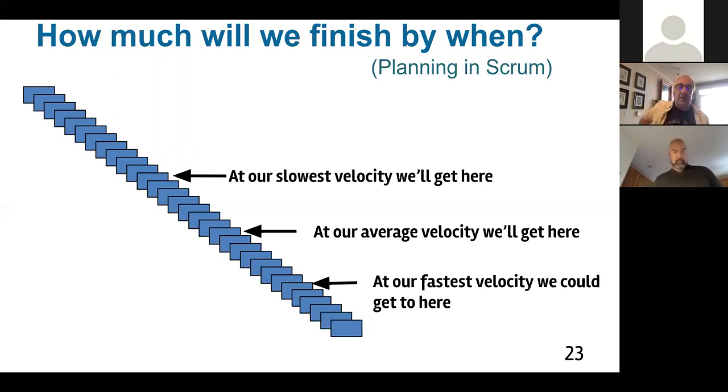But instead, in Scrum, the way we think about this is that we have a velocity, and velocity is a measurement. It's not a wish. You'll notice that the team we just went through in retrospective reported their velocity, and you can do statistics about it. If they have a velocity history, they can tell you their average velocity over time, and their best sustainable velocity and worst sustainable velocity from history.